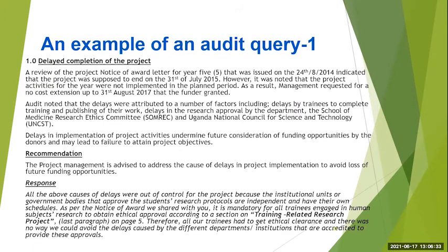So we had to answer that and explain to them that some of these causes were beyond our control. That's why we requested a no cost extension to support these students to complete their research.